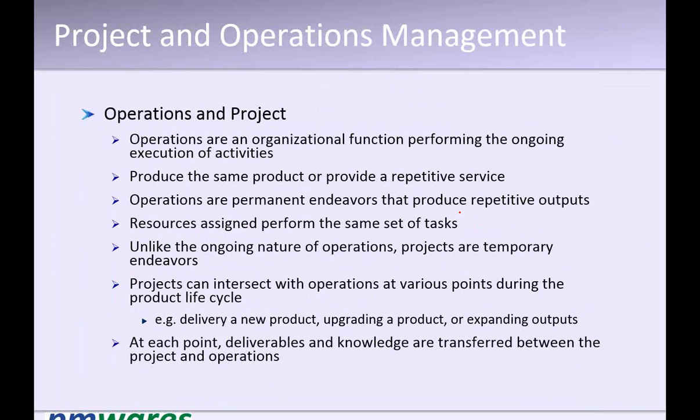Let's take the project of building something new. Suppose you have come out with a new software or a new construction building. Once the building is ready or once the software is ready, what happens next? When the project comes to closure, the outcome of the project is transitioned to an operational group. A building goes to the maintenance team, a software goes to the production support team or maintenance team, right?